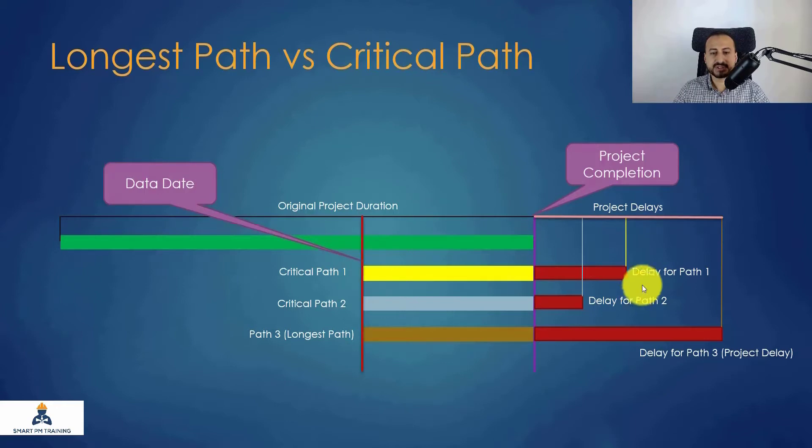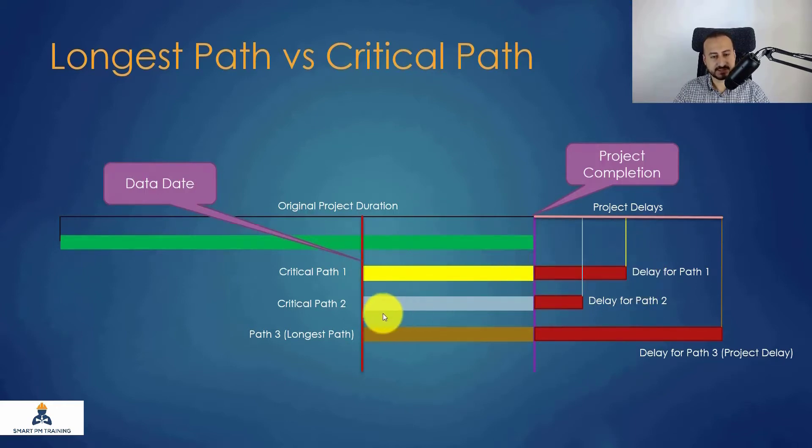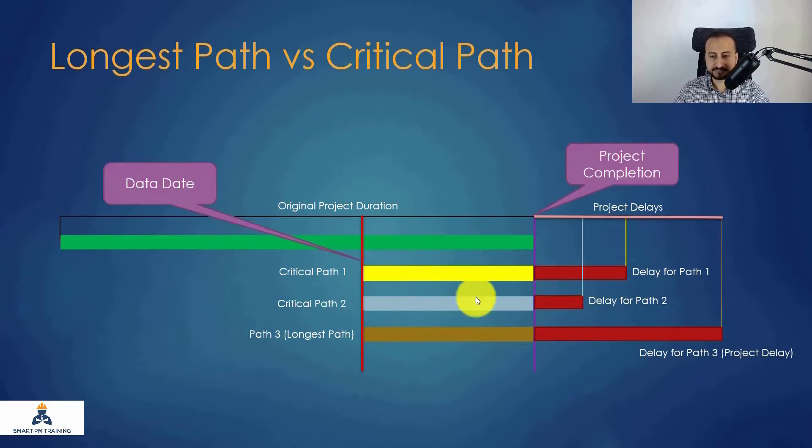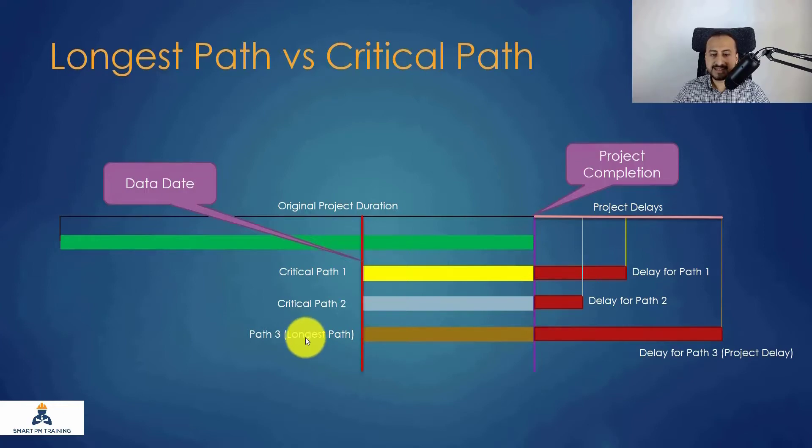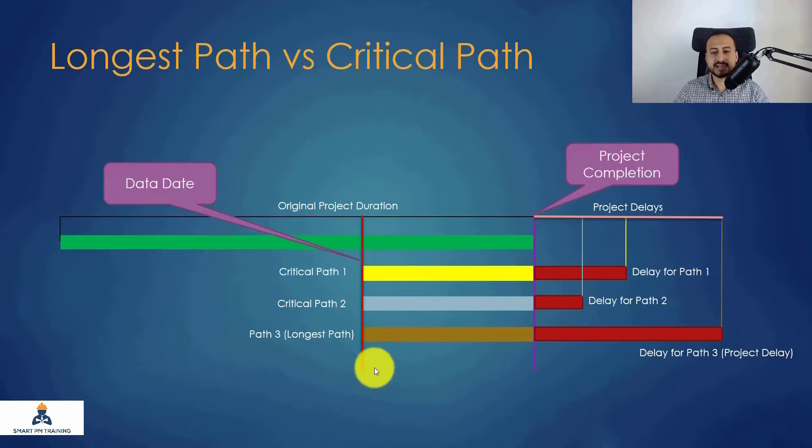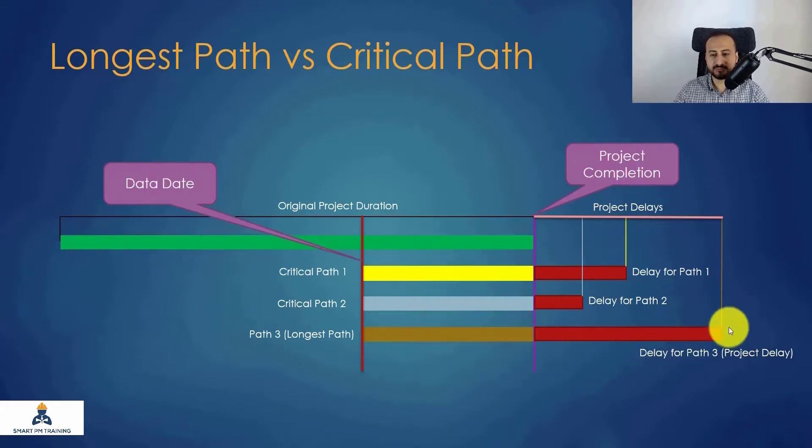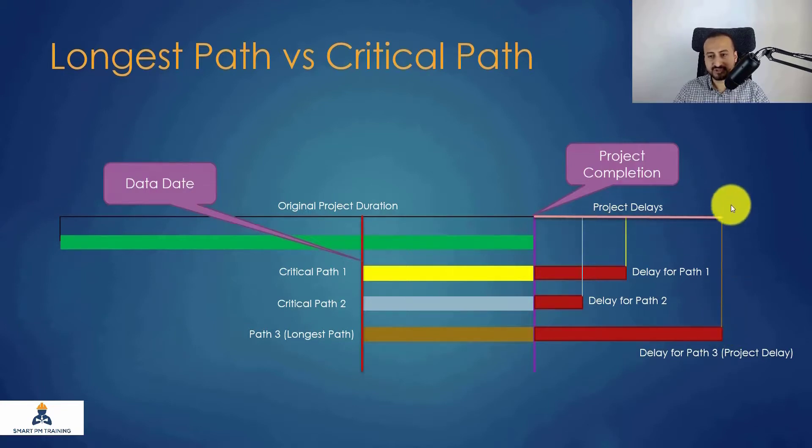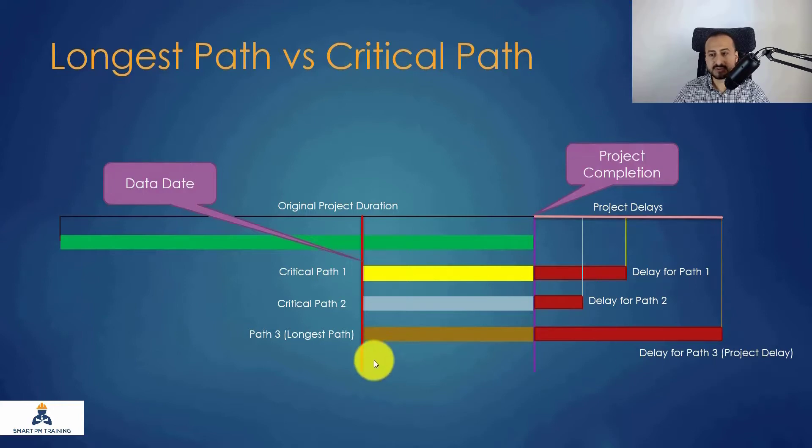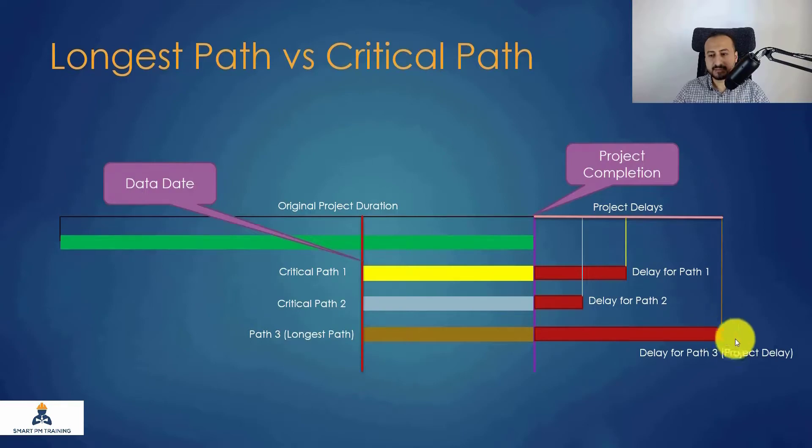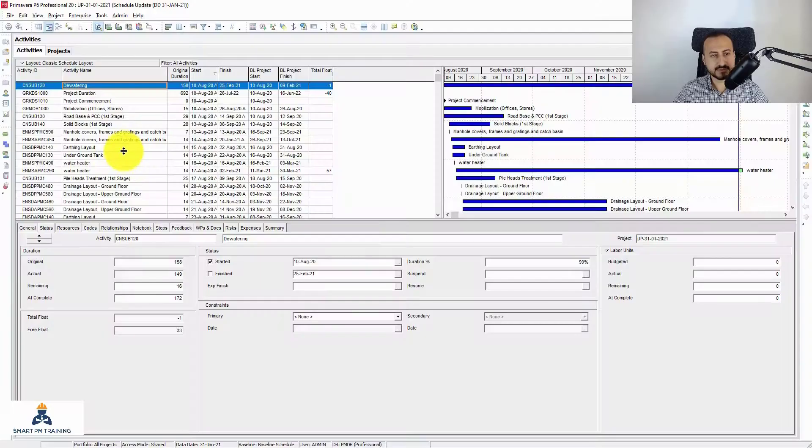For critical path one, I had this amount of delays associated with it. Critical path two, it has this much delay. The longest path is a critical path, but the only difference is it drives the project completion date. So for one path, if I have this amount of project delays which is the same as overall project delays from the schedule update, so the forecasted completion date of this particular path is the forecasted completion date.